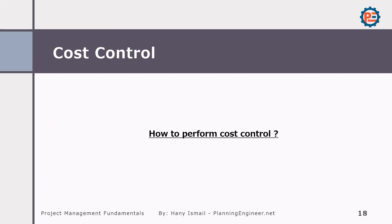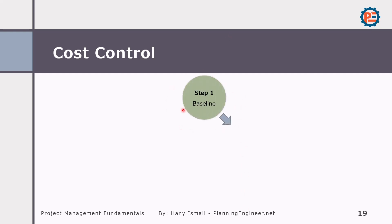So how do we perform cost control? First, you need to have your cost baseline — meaning for each activity in your project, we should know the planned cost that should be paid for it. Then we create forms to collect data, which is very important because you want to collect data in a way that aligns with your baseline.